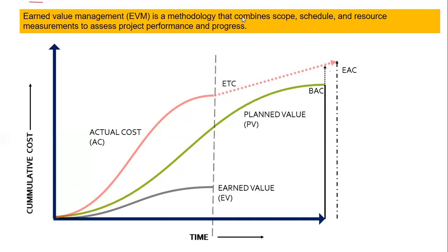Now what is EAC? EAC is estimate at completion, which means that your BAC value was $1,000, but you overrun the budget. Now you need extra budget in order to complete your project. So EAC minus BAC will be your extra burden, which might require approval from your management.